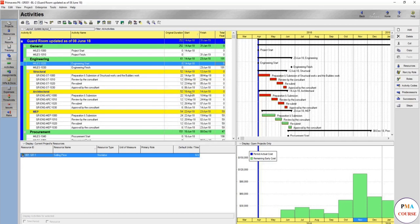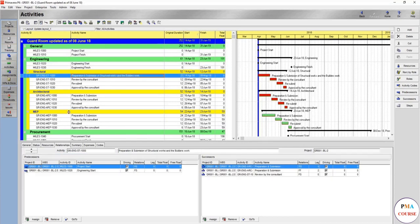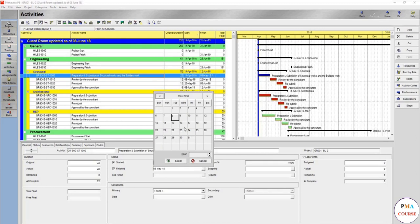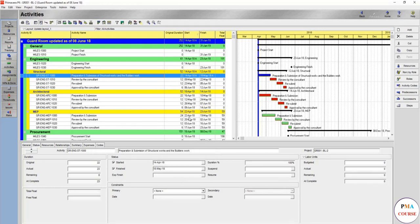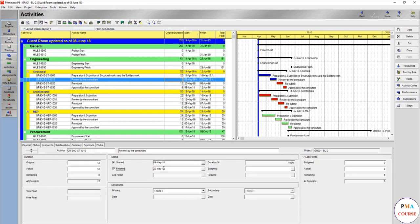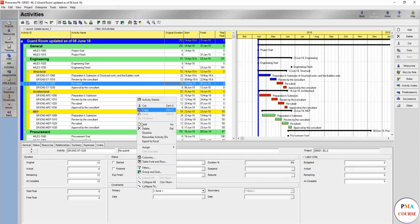Let's assume anything. It's 8 June. We will assume that this is finished and completed. To make anything started, press here. Finished is to press here as well, or you might change the date. You might say finish 10 May instead of 11 May. If you press here only finished, both will be ticked and will take same duration as baseline.